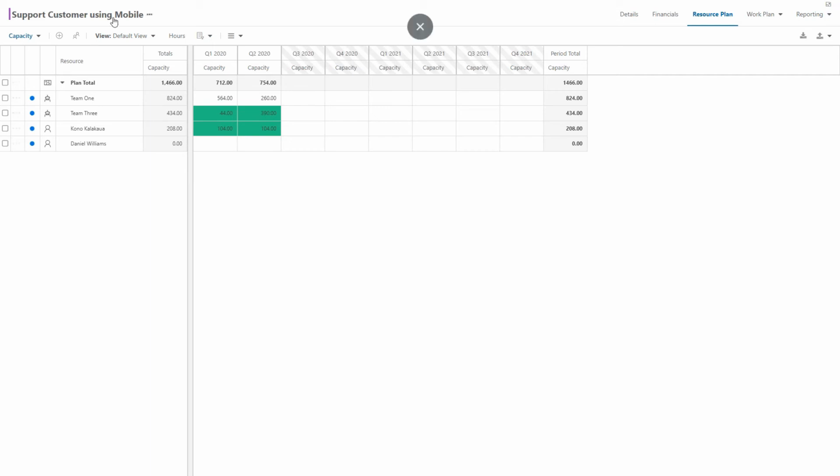In this case, you see we're mapping it based on hours, and then filling in what that demand is. And you can see we're okay on capacity on these particular individuals. If we weren't, these would be yellow or red, okay?